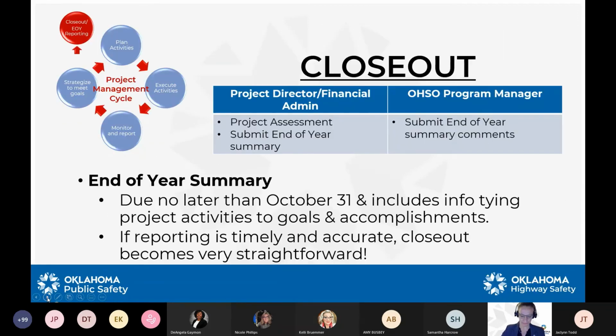All right, good job. Okay, so in closeout here, like I had just mentioned, the end of your summary, most of you are aware, we've got some new grantees this year. It's exciting. So the end of your summary is due no later than October 31st, and includes that information we were talking about, tying project activities to goals and accomplishments. And like we said again, this is just super important. If reporting is timely and accurate, closeout becomes very straightforward.